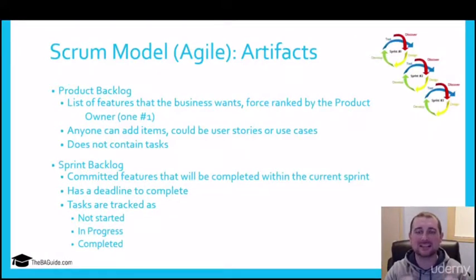The product backlog does not contain tasks. It is simply a list of requirements. It's not of what tasks need to be completed. It's not a task list. It is what requirements need to be completed to meet that business need.